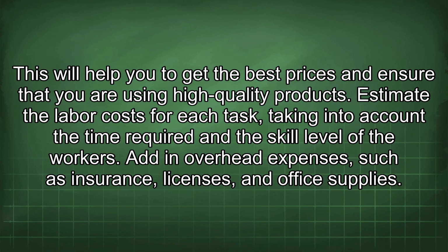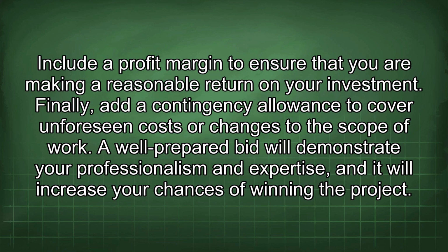Estimate the labor costs for each task, taking into account the time required and the skill level of the workers. Add in overhead expenses such as insurance, licenses, and office supplies. Include a profit margin to ensure that you are making a reasonable return on your investment. Finally, add a contingency allowance to cover unforeseen costs or changes to the scope of work. A well-prepared bid will demonstrate your professionalism and expertise, and it will increase your chances of winning the project.